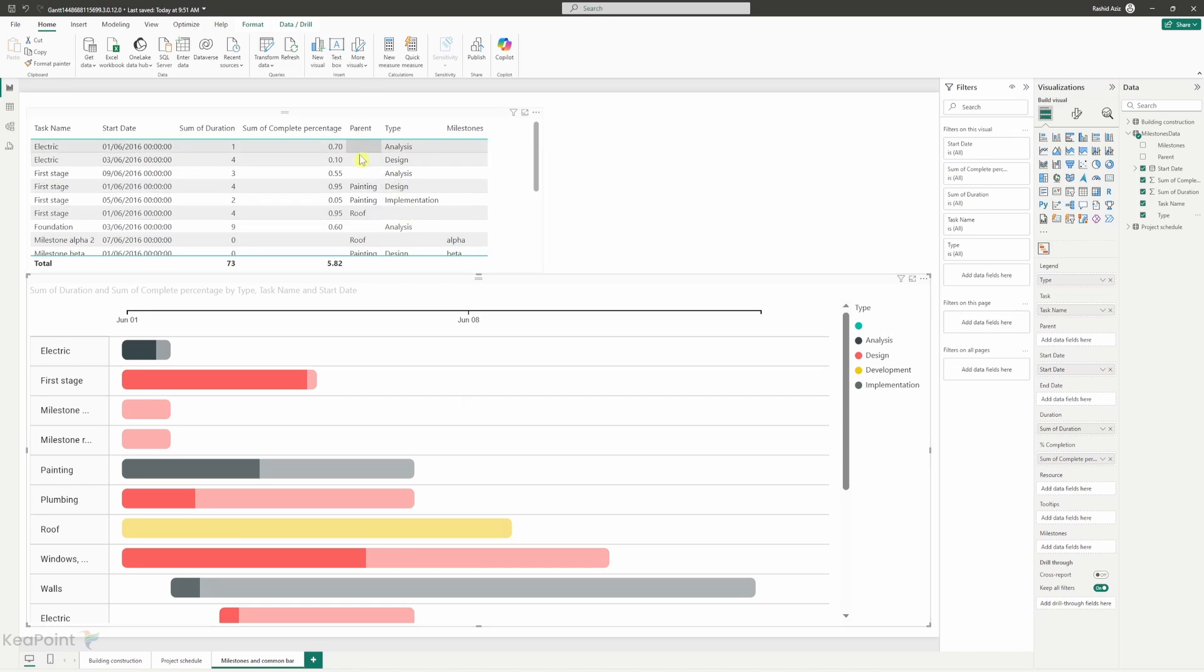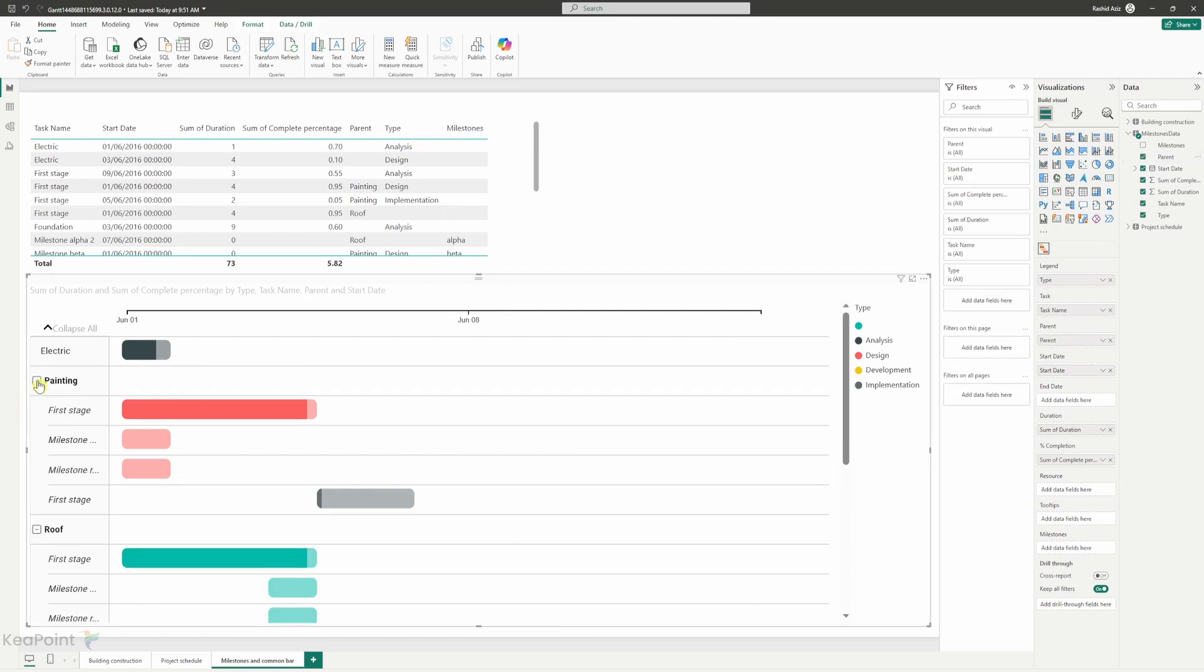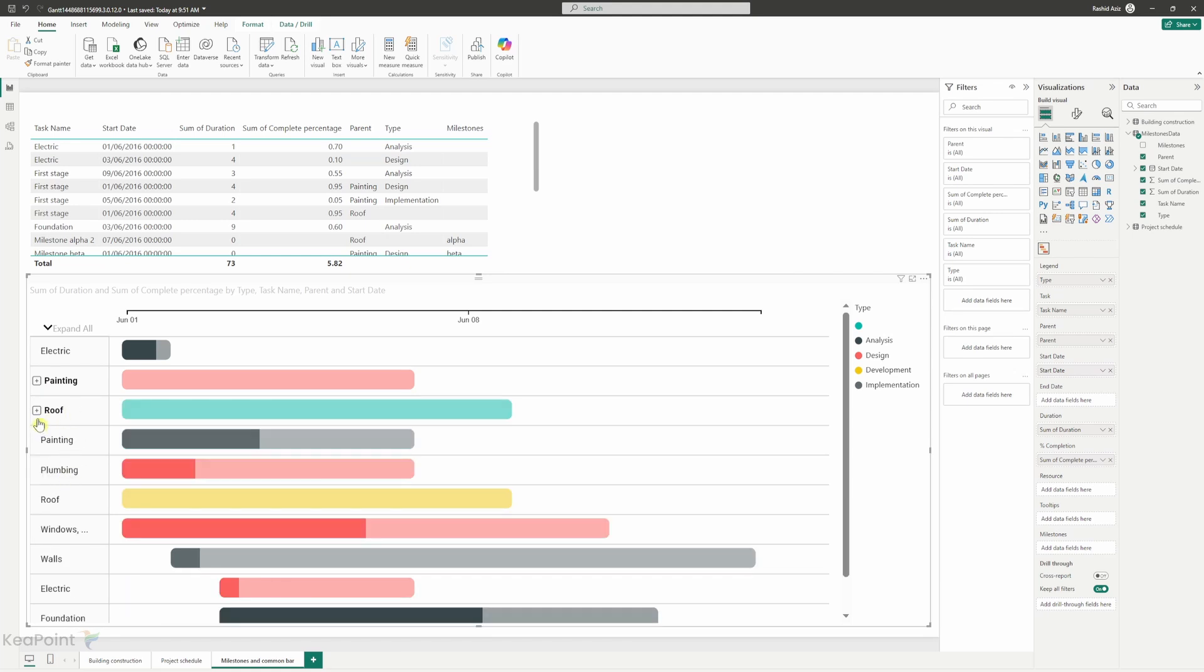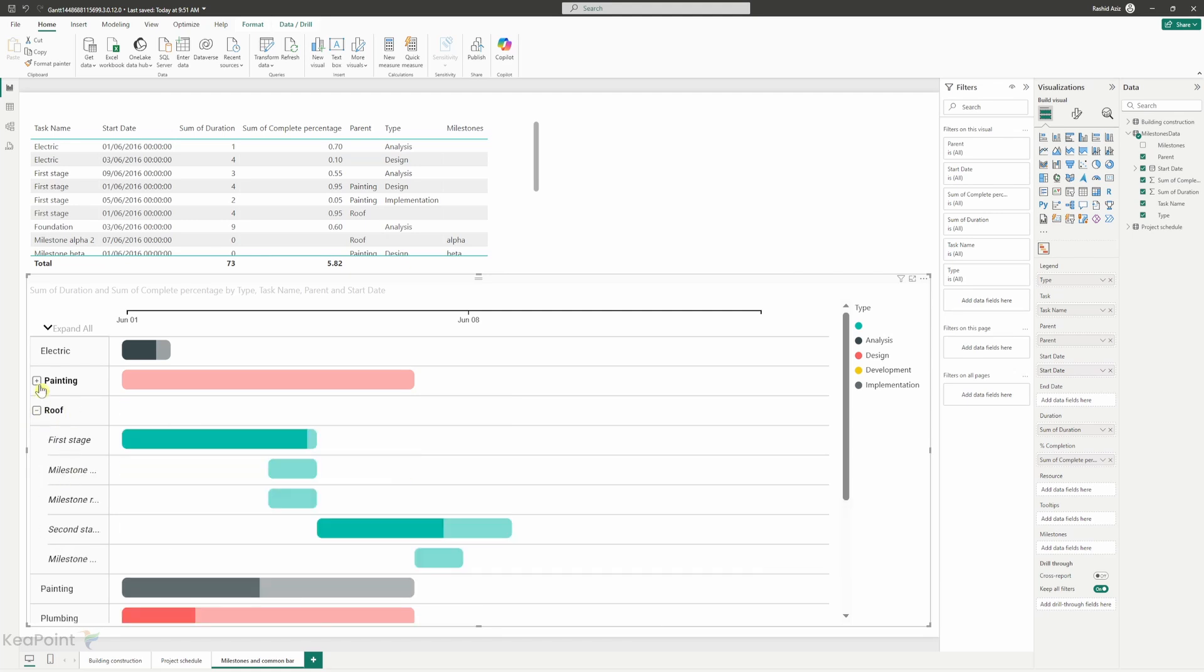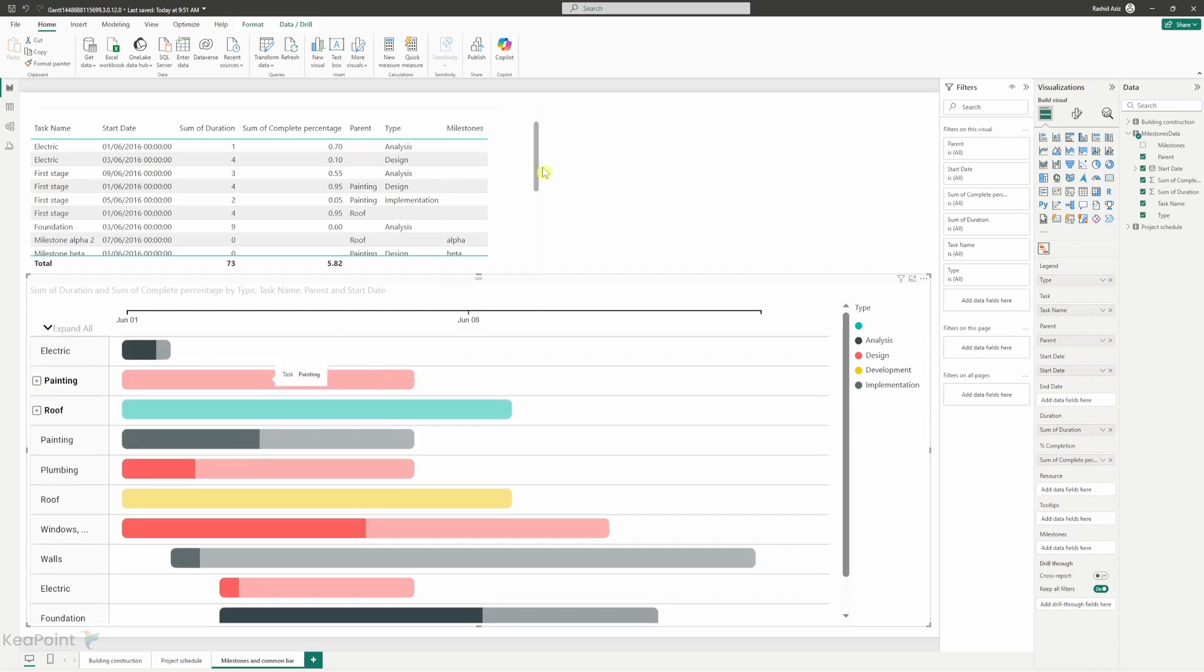Now we have two more columns to add, which is parent and milestone. So parents is going to create a hierarchy, whereas milestone is going to just put some milestone into the Gantt chart for further information. So if I select parent and then I will drop it under the parent field. Now you can see the painting and the roof is a parent for many other tasks. So I will close this one and you can see that it has created a tree structure here. So when you have a task, which you have a parent task, it will automatically create this tree structure for you.